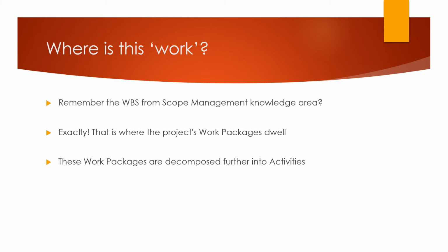You're going to grab those work packages and decompose them down further into activities, the activities that the project team needs to do in order to achieve the work package, right? So for a work package, you will divide it into further activities, and for each activity is where you are going to estimate the time required.